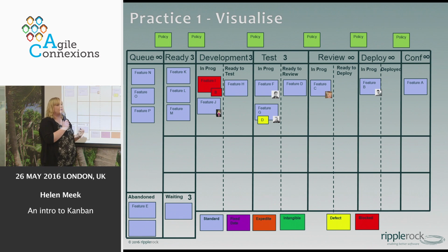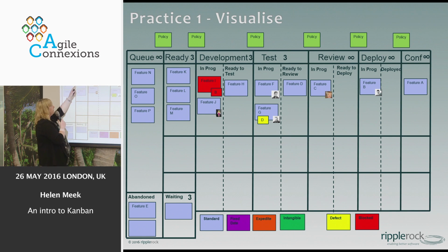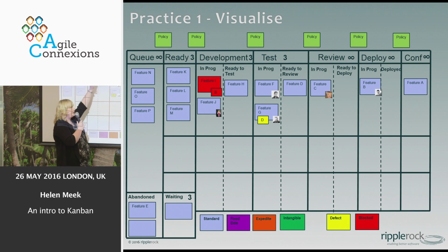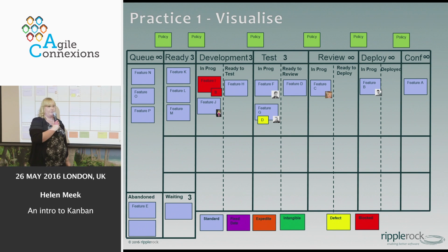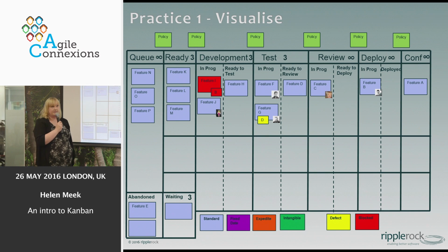Lead time being how long does it take for a piece of work to go through the system. So typically on your board, where you have a ready, your lead time would start here, and once you've deployed it out, then that would be where your lead time stops. And that's how long it takes to do stuff.